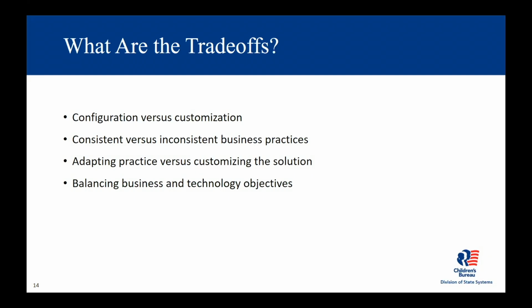The products offer various ways to configure the solutions, including low-code tools. But in some cases, the project must use traditional code to meet a specific requirement. This custom code then must be integrated into the low-code solution and maintained over the life of the application. Ideally, customization should be kept to a minimum. Otherwise, the benefits of a low-code solution are reduced.